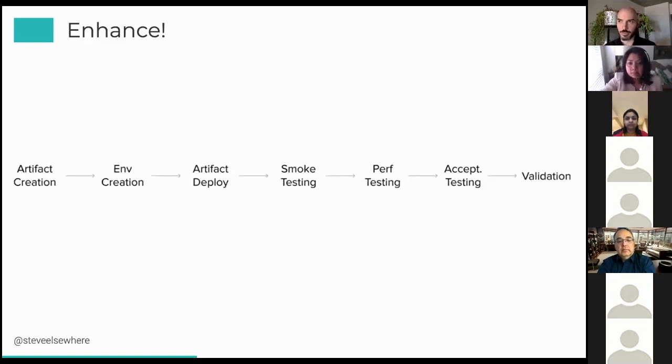It means that we're getting people involved who are very specifically involved in this and concerned with this. So that can keep it very efficient and effective. And then we can zoom out once we've solved the problem or once we have a plan for solving the problem. But I keep it small just for illustration purposes. A typical value stream is somewhere between 15 and 20 steps, but for simplicity's sake, this is a more simplified example.